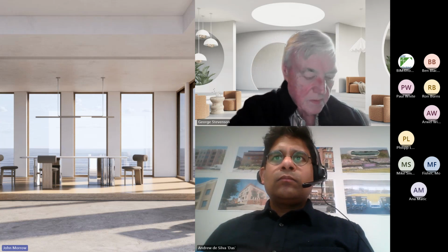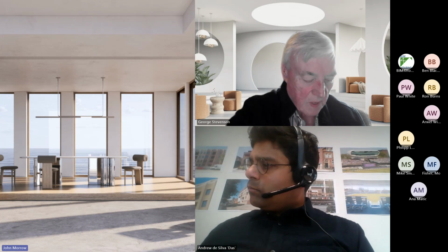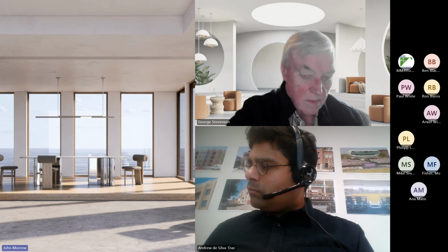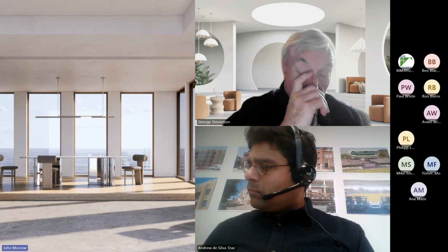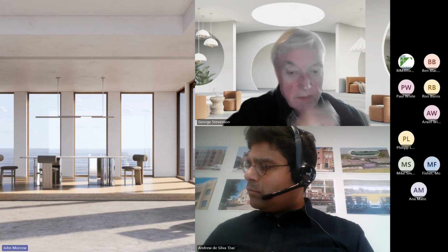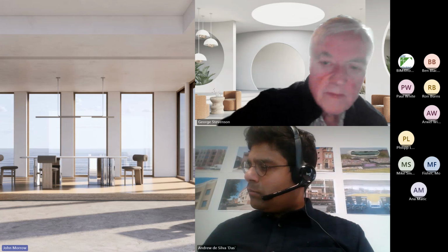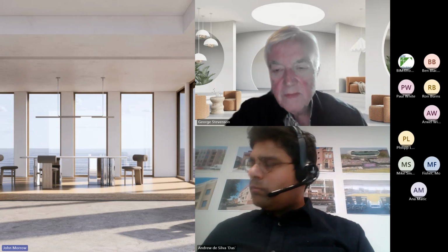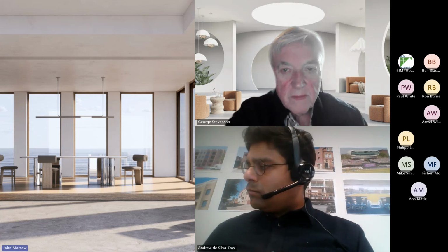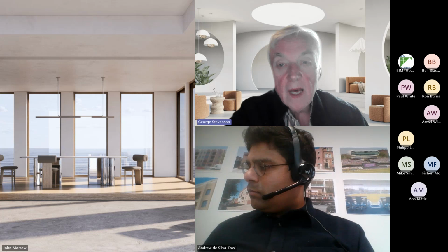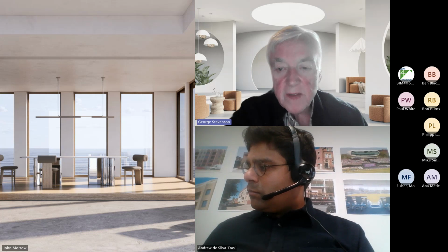And even then, it's still very difficult, because obviously there's a lot of information to scrutinize and go through. The reality is that we're furnished with the majority of this information literally days before practical completion. So we're just trying to force them to gather the information, share it, and allow us time to scrutinize it. Definitely, it needs to be progressive, doesn't it?